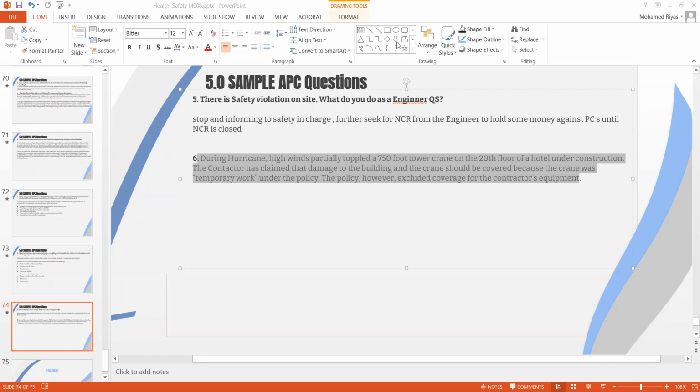You need to always inform the insurance company if there is any material change to the project, even if you receive a new scope, because that is also a material change. Also you need to remember that there is a suspension provision. A partial cessation will also cause the CAR policy to cease to be active. So whatever we discussed here, if there is any material change, you need to inform the insurance company.